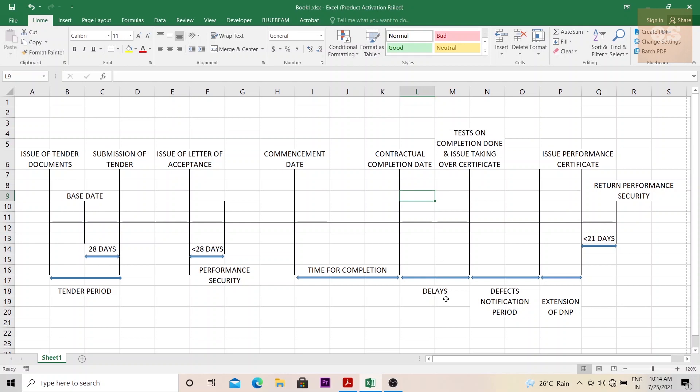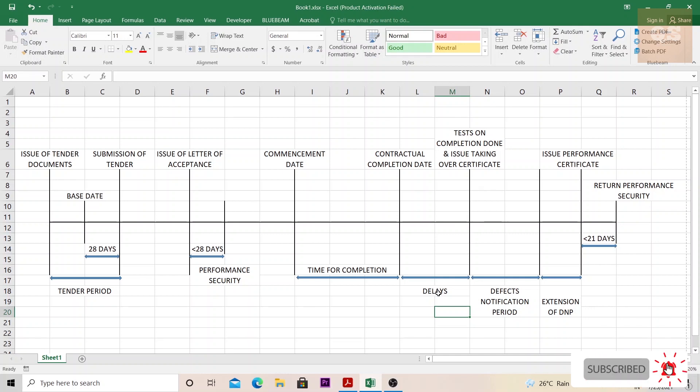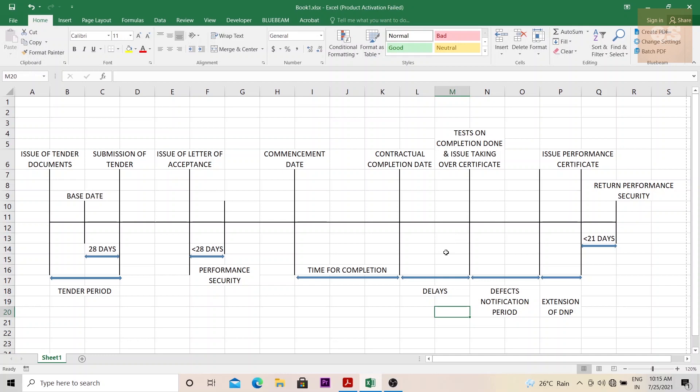But as you know, all construction projects, there are delays happening. In a real time scenario, obviously delays will happen. It can be from the employer side, it can be from the contractor side. Based on that, some delays will happen. And during these delays, some extension of time can also be claimed. That is a whole new process, how you can claim for the extension of time, the cost for this extended time that is basically being claimed. For that, there are different steps, lots of documents need to be prepared, the delay statements to be made, then the planning program needs to be updated. And based on all these, final extension of time is decided and the cost, the total cost that is incurred during this time is also prepared. That is a whole new process. I'll try to make a video on extension of time later on.